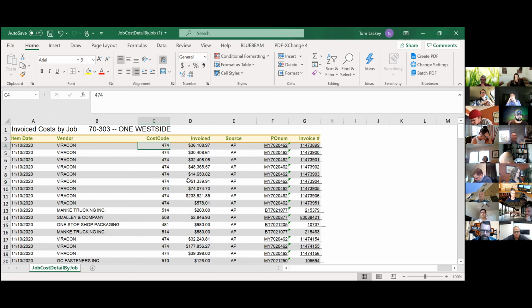But right now we don't have good standards for billing. So basically, for materials we're only going to bill through the 10th, but for labor, we can project out labor. 20 days, right? Okay. Yep. And remember, it's only for when you're billing for stored materials, so it's only going to be a month or two out of the year you're doing this.